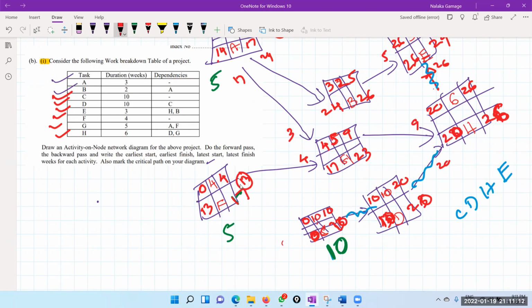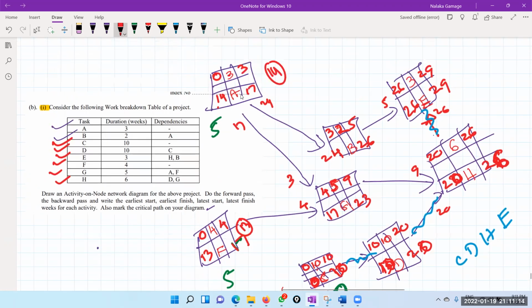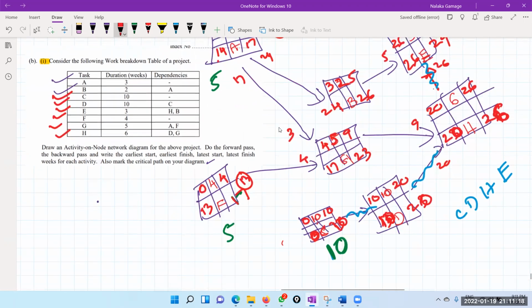Right? Because the buffer is big, 13 days and 14 days. 13 days and 14 days means, yes, we are going to start both, but at the end of the 10th day. So then we can give, because here we have 10 computers, we can give 5 to this one, other 5 to this one, and both can be done.